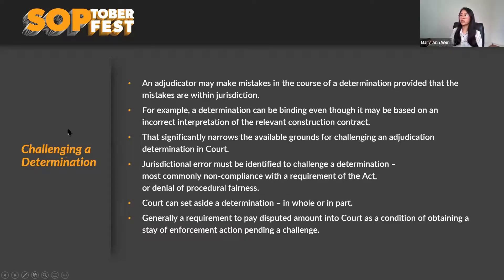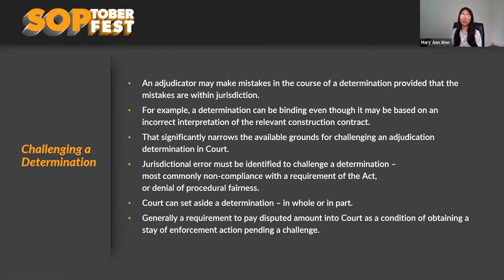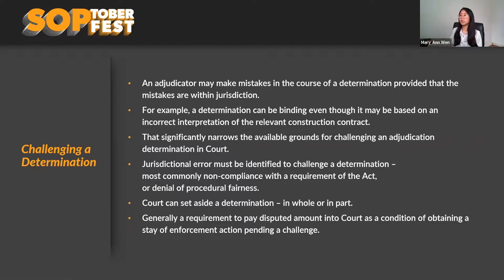If you want to challenge a determination, you are entitled to do so. Under section 22(5), the adjudicator can correct clear errors — accidental slips, omissions, material miscalculations, defects in form — on their own initiative or on application from parties. A determination can be binding even though it may be based on an incorrect interpretation of the relevant construction contracts. This narrows the available grounds for challenge — you can only challenge a determination if there is a jurisdictional error.